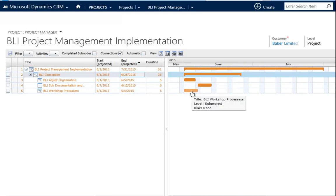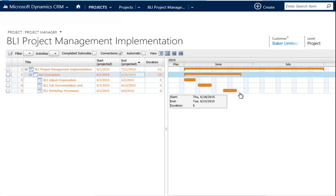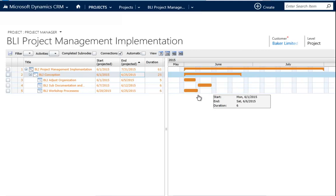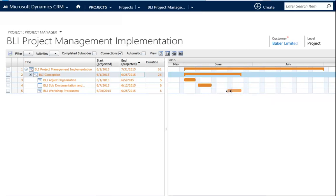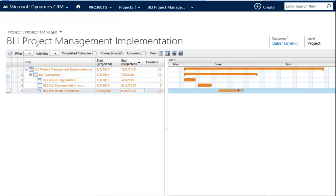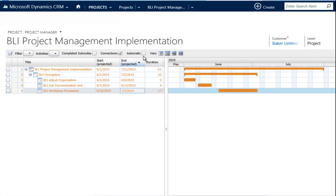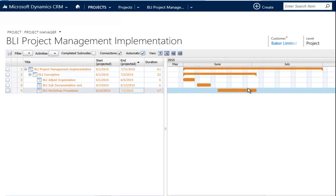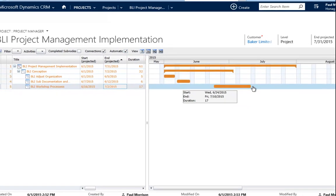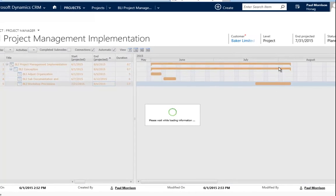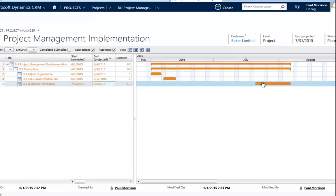You will pretty soon figure out that this is a child node and above the parent nodes. A child node cannot be outside its parent. So for example the workshop process is part of the conception so it cannot be after the conception because it's part of it. So I cannot move it on the outside. It can only be inside if I need to extend it, I need to increase the size here as well. So if you don't want to do everything manually, hit automatic and the system will think for you. So if I now increase that or move that to the very right, everything will move to that.